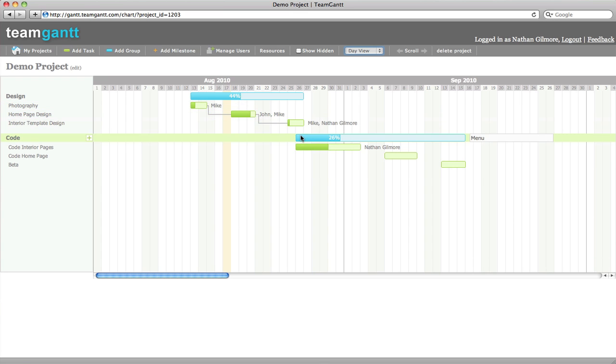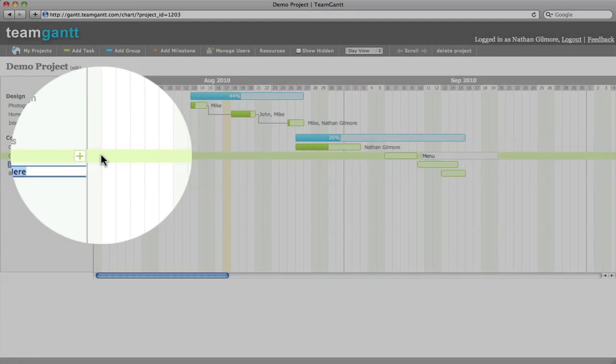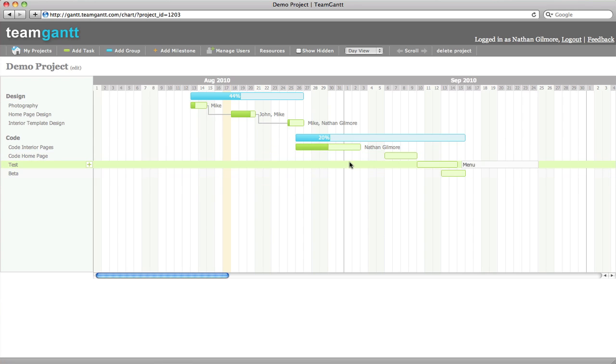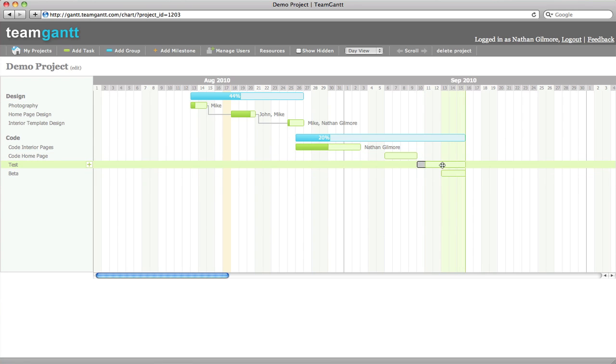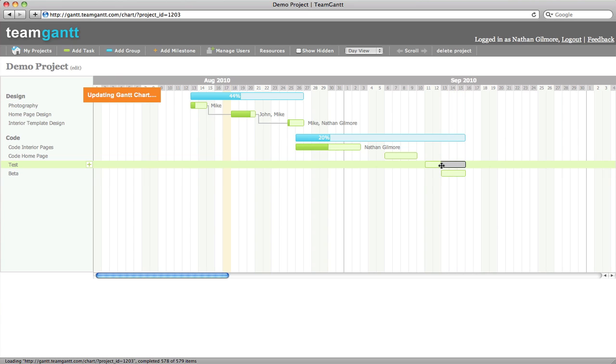We'll also show you how to add tasks. You can just click on add task, type in the task name, hit enter, and you'll see your new task is created. The bar is automatically added to your Gantt chart, and you can resize it to fit where you like it.